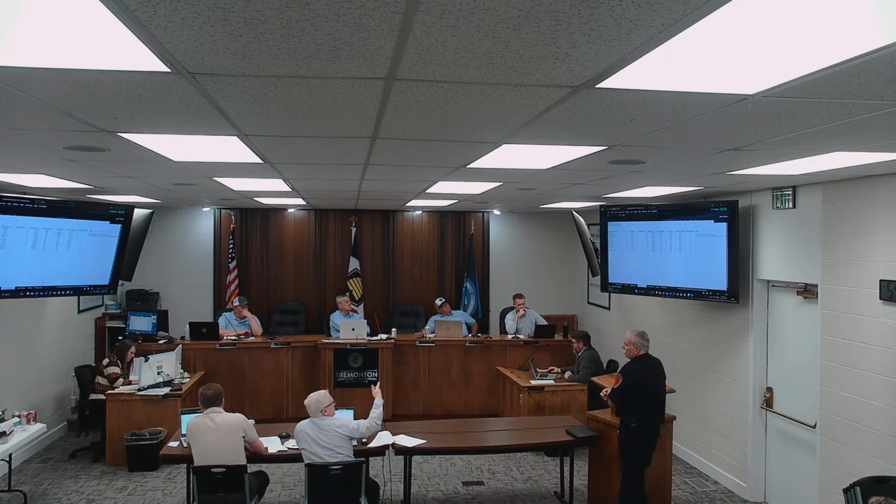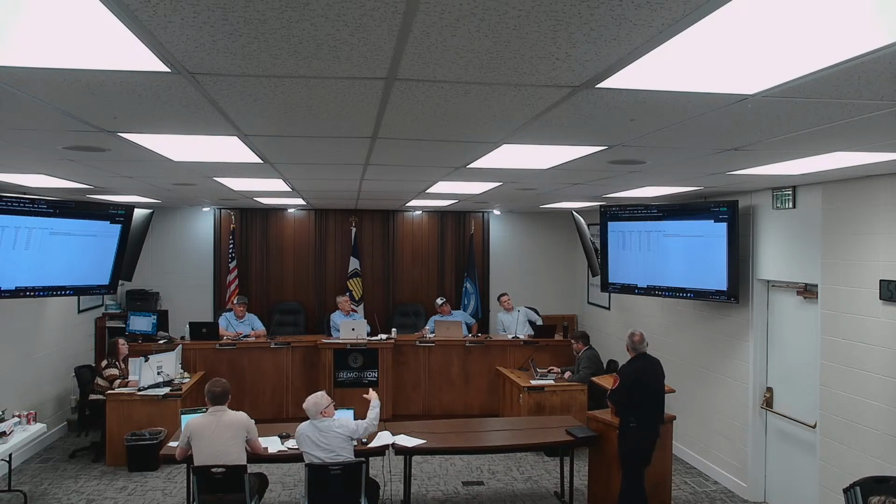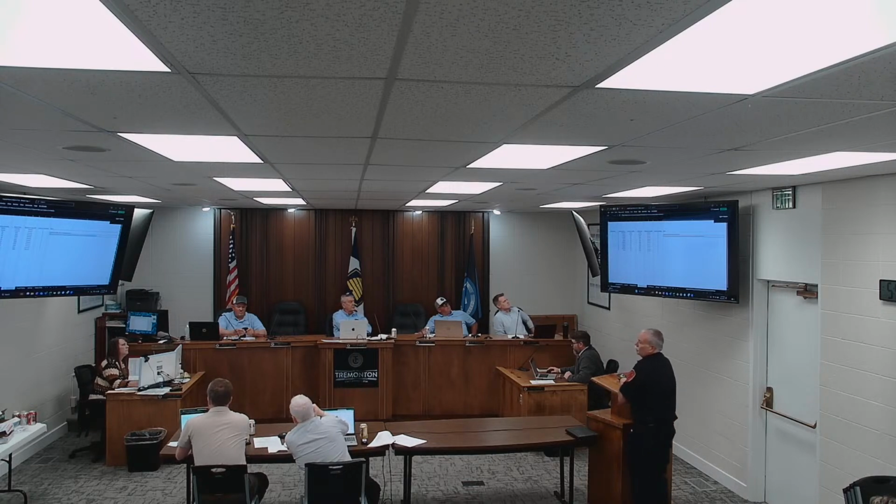So what we do is change the project year of when the money has to be available. We would change this to 2027, and then in the notes on that line we would put, order in fall of 25. Yes. And funding for this line would come through the next line down. Oh, I see, you already put that.